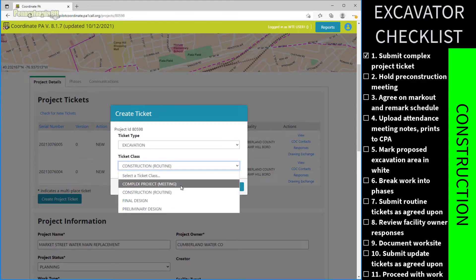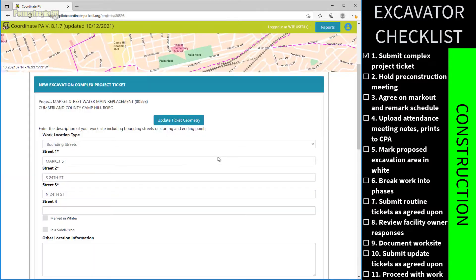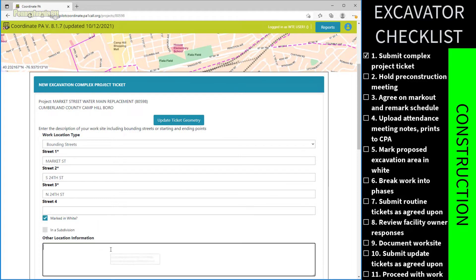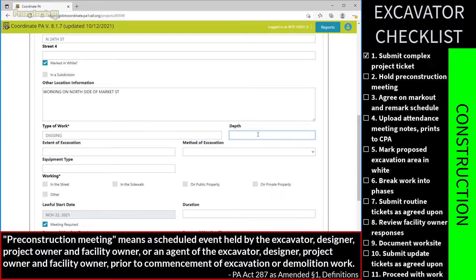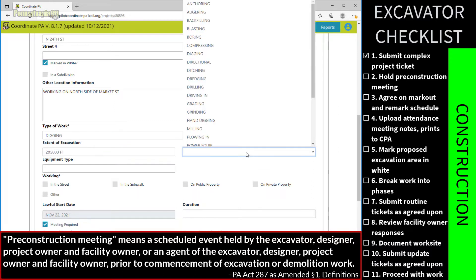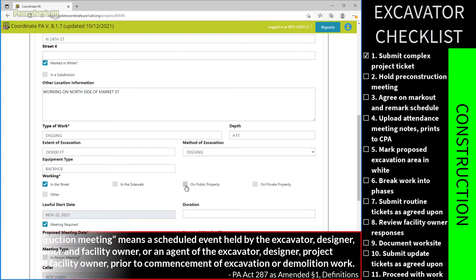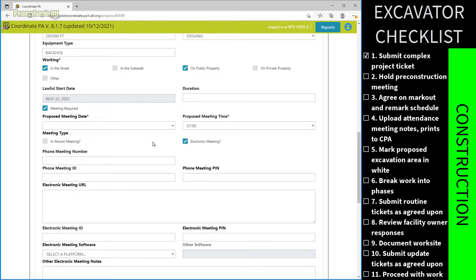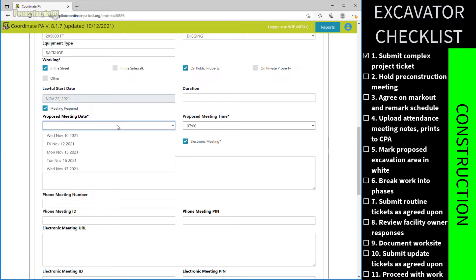The complex project ticket serves as notice to affected facility owners that a potentially disruptive project is coming and may require markouts and protections over an extended area or timeframe. Complex project tickets are placed within the CPA project and allow the excavator to schedule a pre-construction meeting to review the project with facility owners. The pre-construction meeting is a scheduled event held by the excavator, designer, project owner, and facility owner prior to the commencement of excavation or demolition work. The excavator must indicate a time, date, and location — either in-person or virtual.